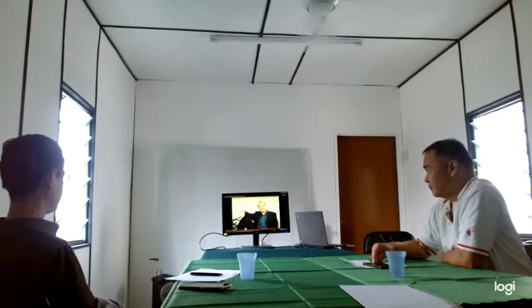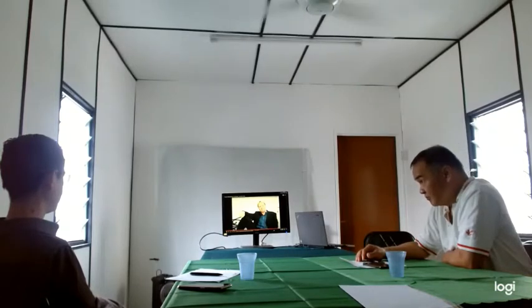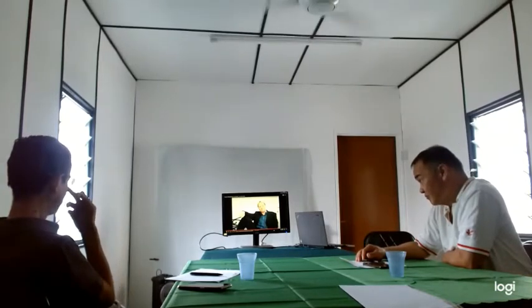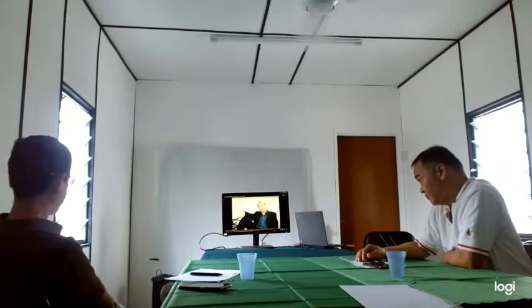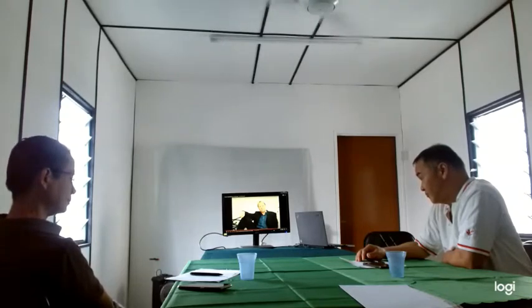During the review, you should ask three questions. First of all, what was good? What went well? That we can record and make sure that we repeat next time. That's the difference between luck and skill. Knowing what you did so you can do it again. So what was good? What was bad?